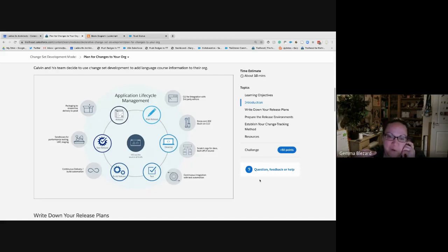Now, in a waterfall environment, that's not so easy because, well, ultimately it ends up happening with Salesforce anyway, but in a waterfall environment, you build, you finish the build, you do a review, and then you go straight to test. And you leave the users alone for like 2 weeks to test. And then at the end of that, you'll have some changes that need to be made as a result of the tests. You make those changes and then you deploy into production. And the only difference between that waterfall approach and an agile approach is that, once you've deployed and released that functionality, it tends to be a much larger release.